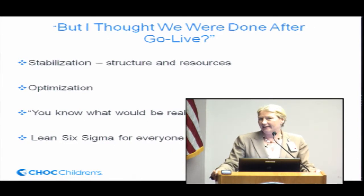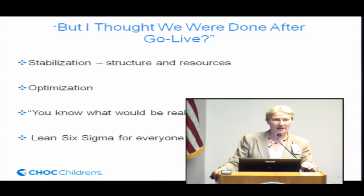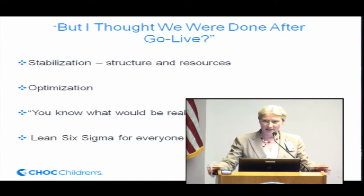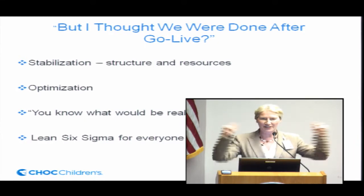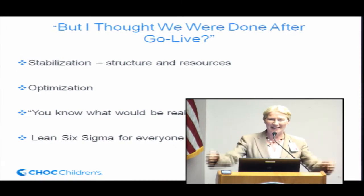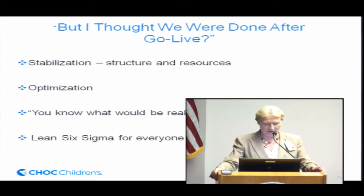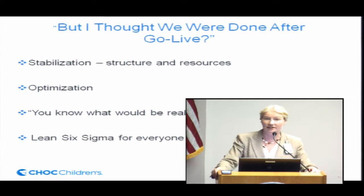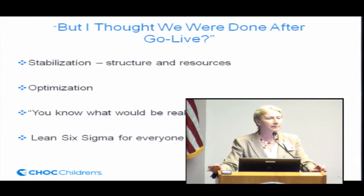Well, I had a lot of that in the last month. And of course, the money's spent, and there's not a lot of money left for the you know what's neat. And the scope creep. Everybody's so excited, and they want to get in the building, and they want to do stuff, and they want to ask, could I just have this? Televisions have been the biggest request. Everybody wants their own television in their own area. That's an easy one to fix, but scope creep is a real problem because everybody's excited.